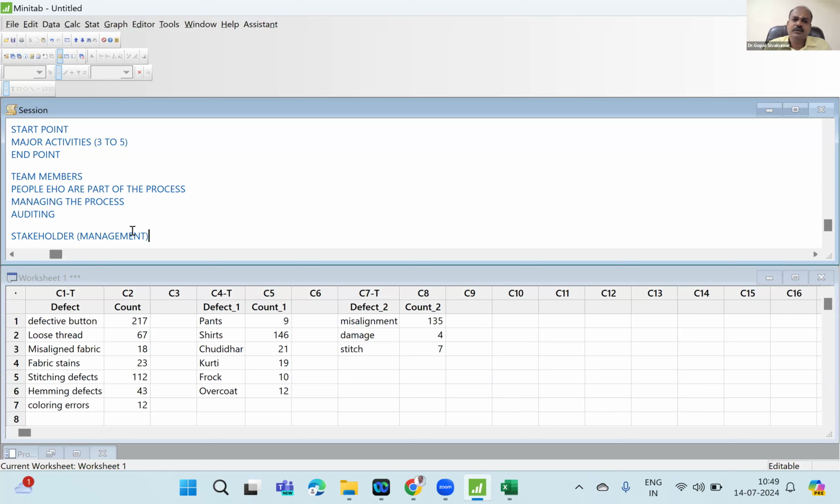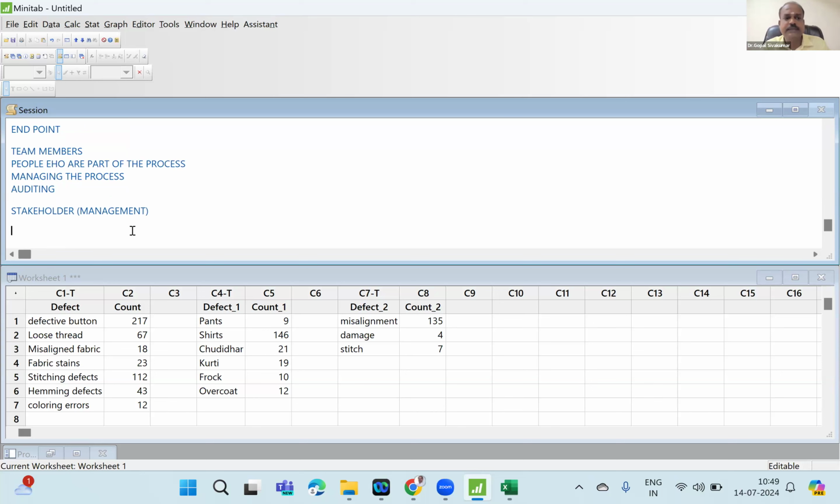One or two negative cases, you don't have to worry. But if the majority is not supporting, then even a simple project, you may struggle. So this is called force field analysis, right? You have to do this kind of exercise also while creating the team.